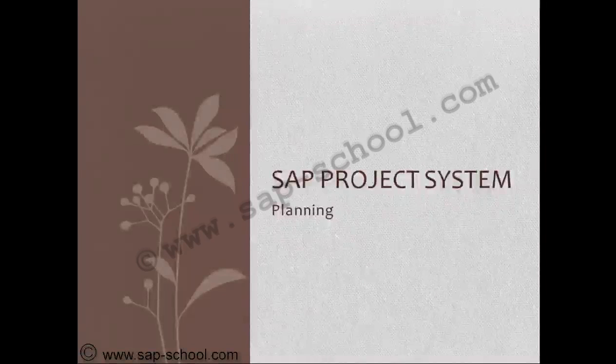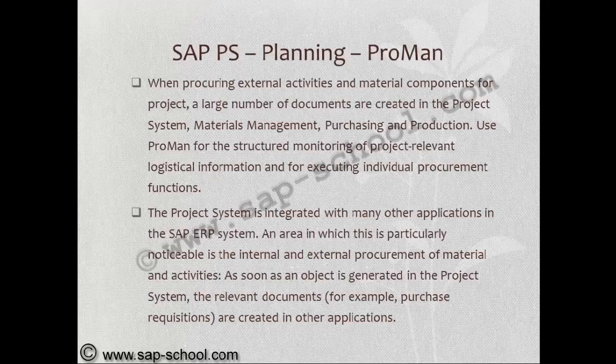We see another monitoring tool is ProMan. When procuring external activities and material components for a project, a large number of documents are created in the project system, material management, purchasing and production. Use ProMan for the structured monitoring of project-relevant logistic information and for executing individual procurement functions.